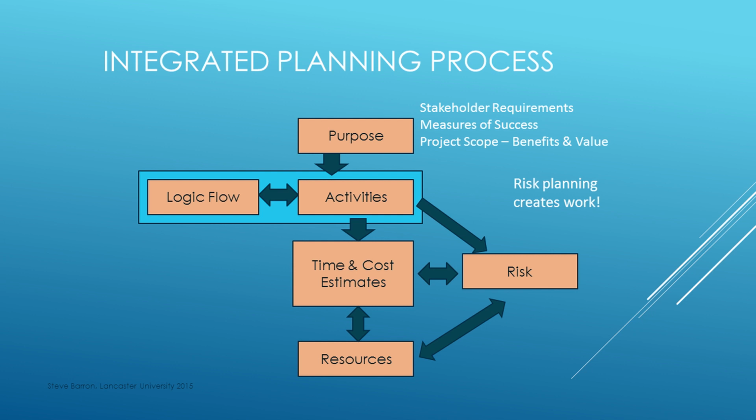Once resources have been allocated to an activity and the risk assessed, we can develop estimates. The time duration and cost of an activity will depend upon the resources allocated, and the accuracy of the estimate will depend upon the associated risk.